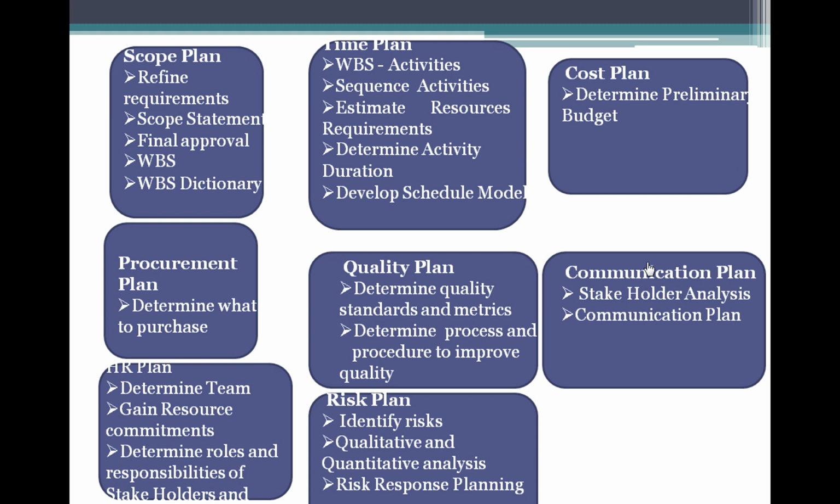the project charter, then he goes back and modifies the scope, and he will have meetings with the sponsor and key stakeholders. Because the cost crosses the limit, he has to refine the scope statement, and then the key stakeholders decide that some requirements can be removed. Then again he updates the time management plan.